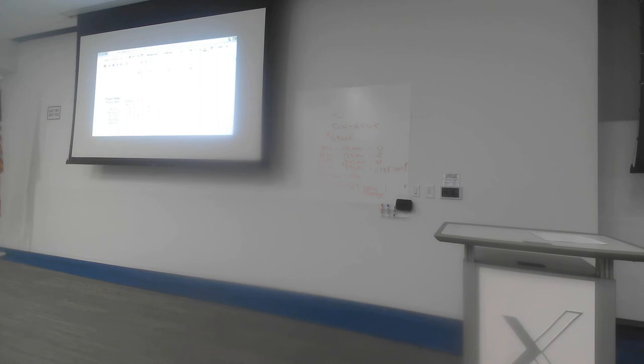So again, I've achieved what I set out to achieve by crashing those two activities. The overall project duration has come back by 1 day, but at the same time, another critical path has arisen. So now I've got three critical paths, which is perfectly feasible. It's perfectly possible to have that. I can have lots of different critical paths all at the same time.